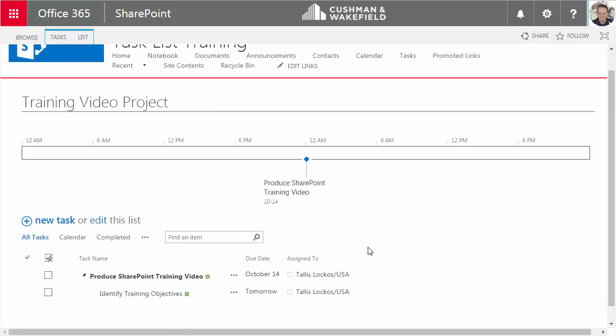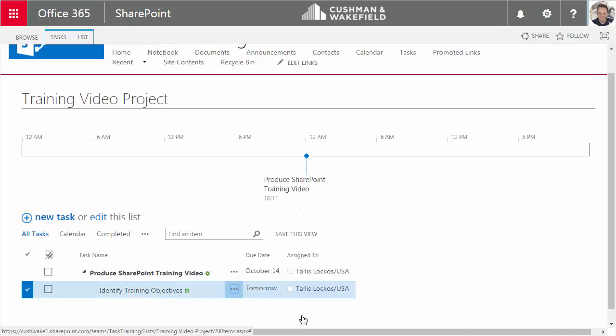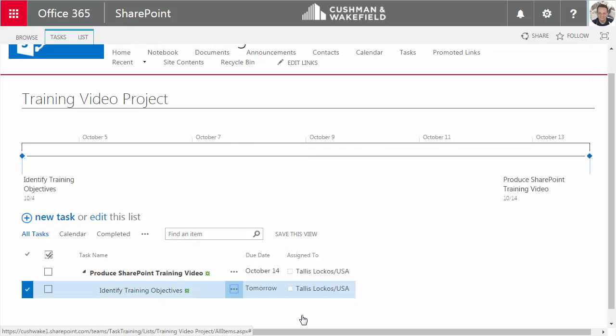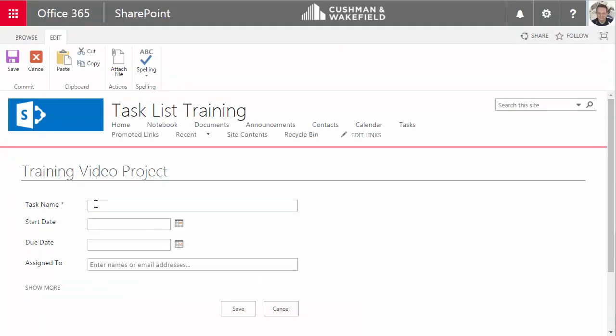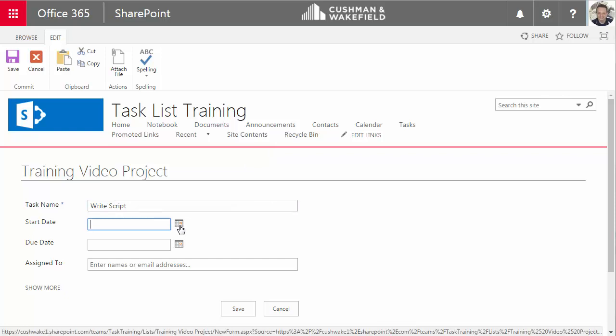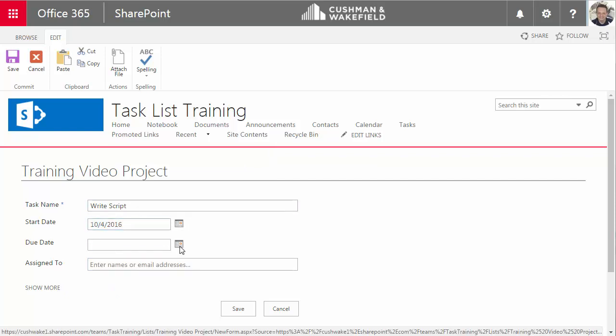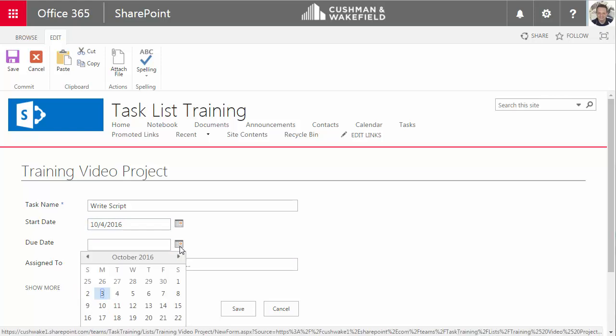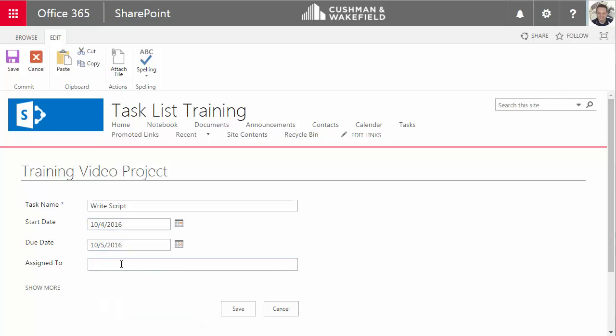Now, you don't have to stop editing each time, but I'm doing it so I can demonstrate some features more easily. Now, I want this task to show up on the timeline. So click on the ellipsis and choose Add to Timeline. Okay, another way to add an item to the list is to choose New Task. I'll name this task. And here I have an additional option that does not appear in the task list view. I can enter a start date. I'll enter a due date and assign it to me and then click Save.